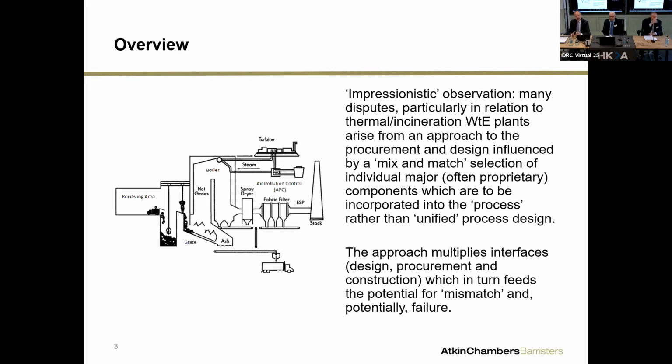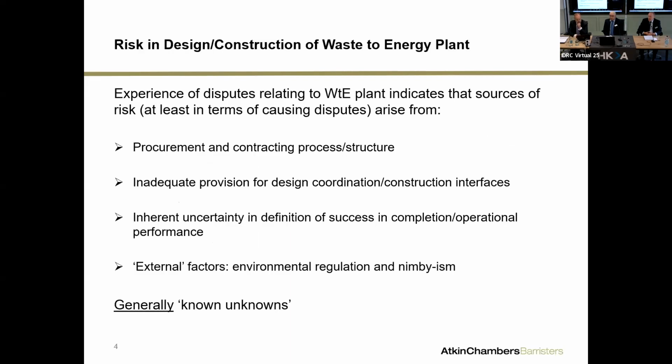What happens, in my experience, is that if you multiply the interfaces in design and construction, you multiply the problems that you'll incur, if you don't think through in advance how you're going to deal with those interfaces, both contractually and as a matter of practice in design and construction. So my experience is that, I'll try to break this down a bit, there are probably four main areas that cause disputes with respect to waste to energy plants.